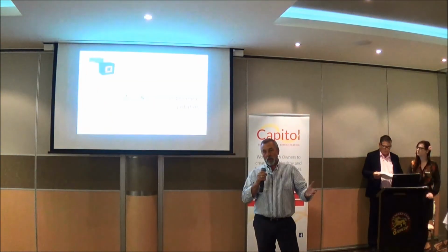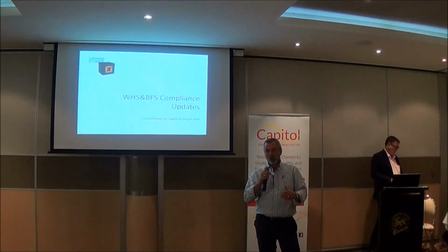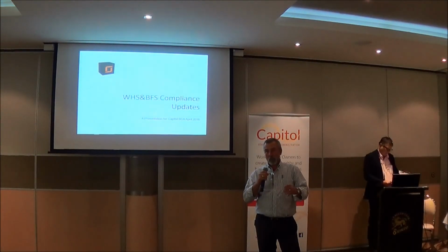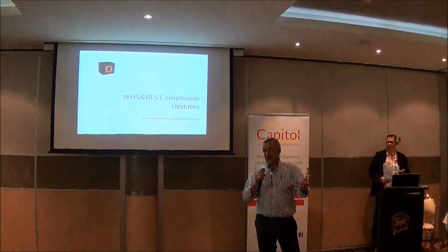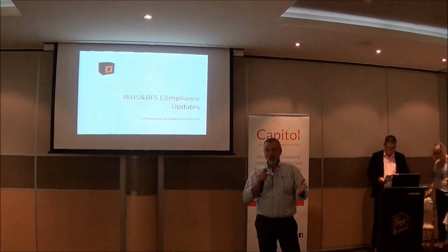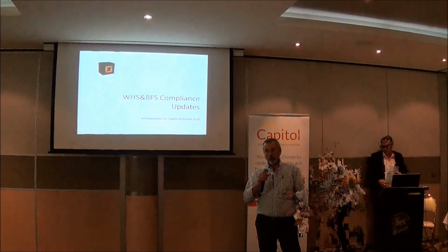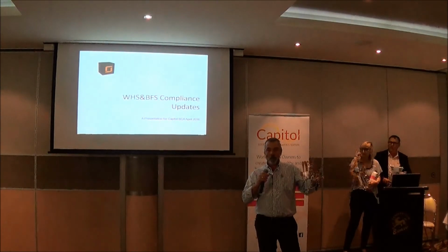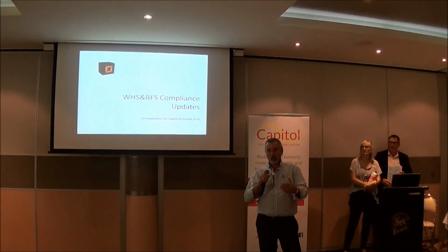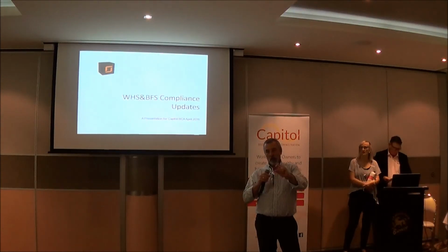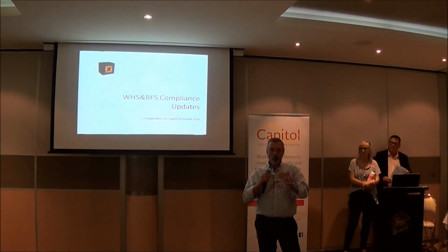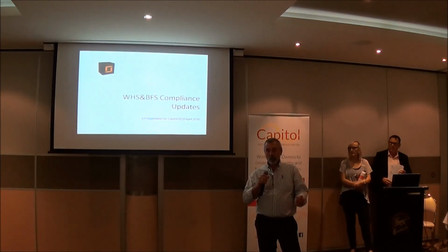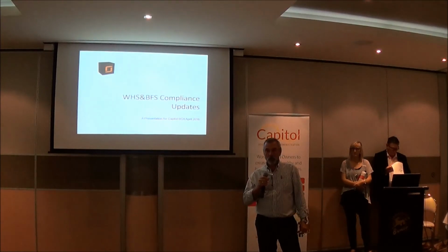The way we prepare insurance valuations, we do a quite detailed estimate of the construction of that building. I've worked on probably half the high-rises that were built on the coast, for 25 years, so I know basically what building costs are for each building. We also work on new buildings, so we get feedback from builders as to how much buildings are costing. So you work it out in quite a bit of detail, and then you would allow something like 2.5% to 5%. It would also depend on the quality of the information you've got. Sometimes we don't get really good plans, and you've got to measure areas and various things, so it depends on the degree of detail available to prepare the estimate.